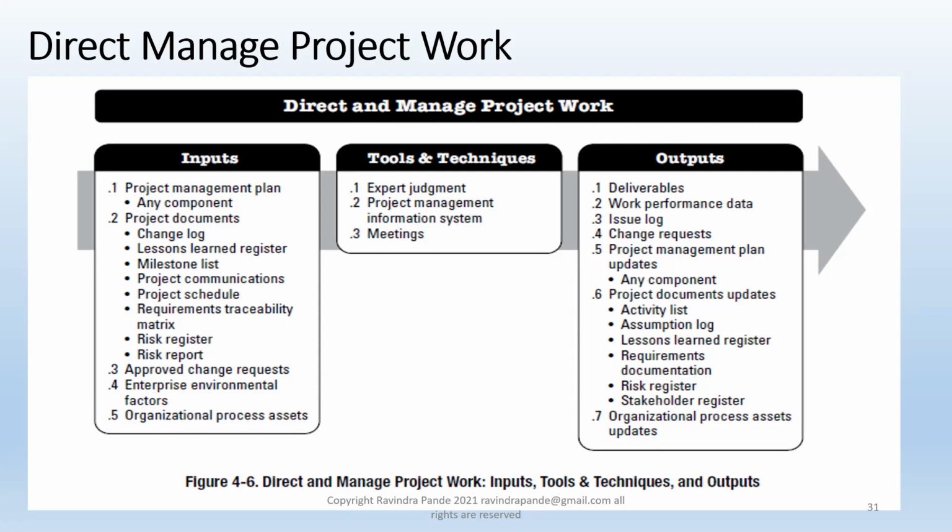Then the issue log. There's a very small difference between an issue and a change. An issue can be a change as well as a rework. Now let's understand the rework here. You developed something, you gave it to the client, and the client says, no, the web page color is not the green I want, the green I want is much lighter than this darker green or something like that. So there's an issue, there's a rework on that work item which I've just delivered.